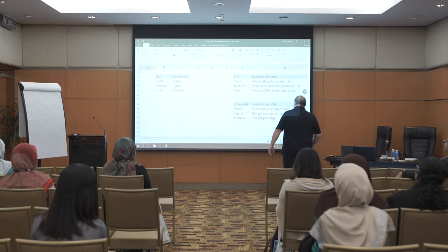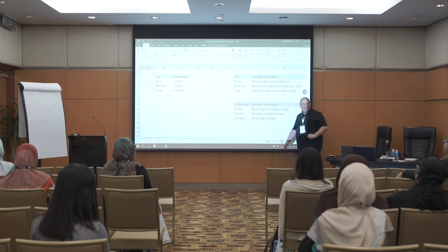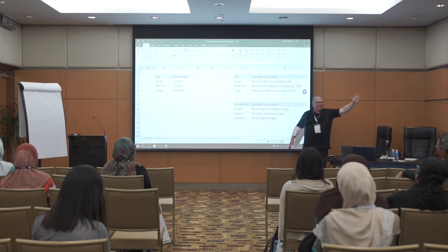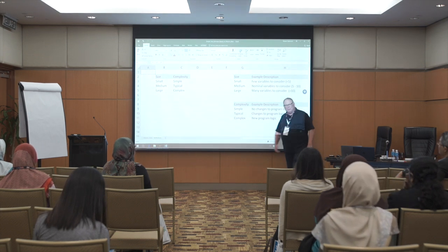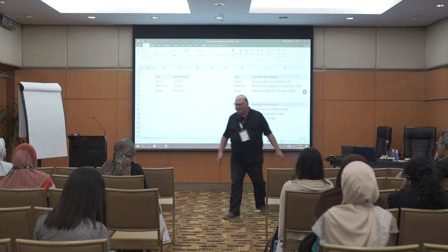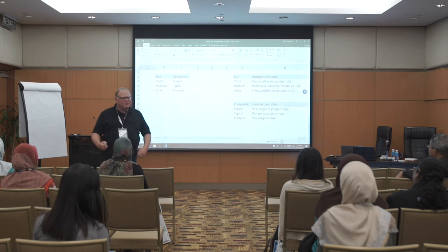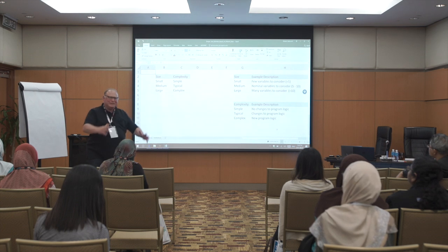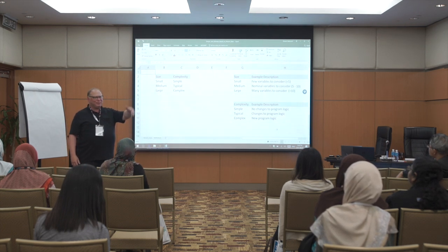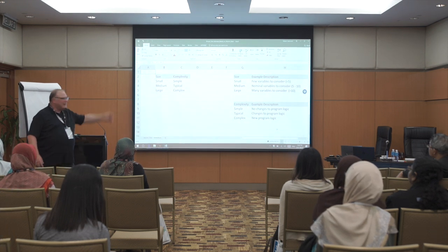So for small, we said very few variables to consider. So I figured under 5. There's only 5 or fewer factors. That's small. For medium, we have a nominal number between, let's say, 5 and 10 factors. And these are factors you have to study. You have to change them, observe them, manipulate them, do the domain analysis and mind maps and whatever, real work with those factors. Don't just make up that of course there's 1,000 factors. What are the 10 that matter? What are the ones we care about? And large would be anything greater than 10, for example.